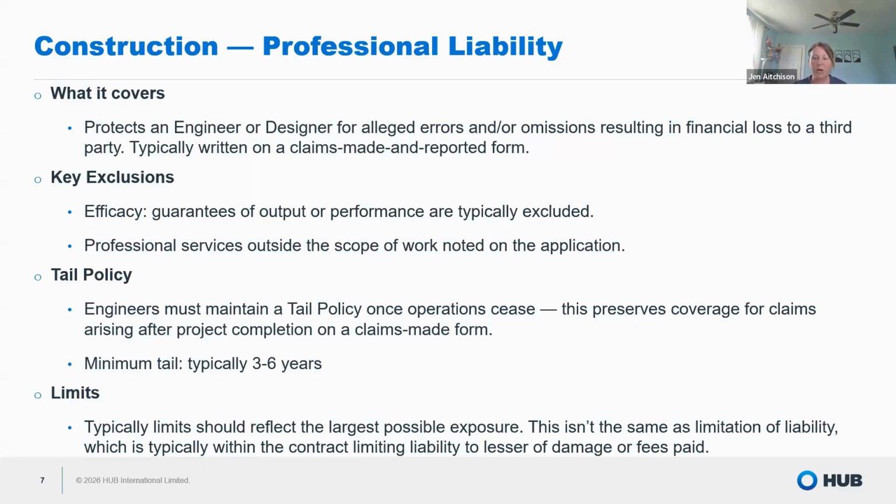solar design type work. Sometimes you'll see higher limits. I've seen upwards of 30 million required in some cases if you're doing something that's really high value and the exposure is high, or if you're working with a counterparty that already has a risk manager and they've evaluated what they expect that risk exposure and what their risk tolerance is. So there are cases where it can get quite expensive and sometimes be limiting.